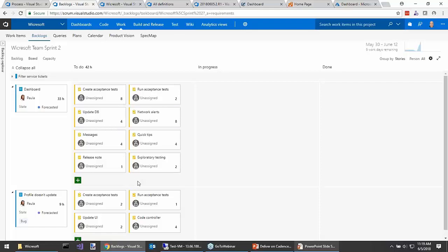Notice as they created the plan, these hour estimates, and we're talking about hours now when we're at the task level, not necessarily story points. These are a little more concrete and less abstract. I know some teams that will do that. They'll just put ones in all these and they can forgo the sizing of the tasks, but they'll still have a way in looking at the burn down to assess progress just basically by counting the number of tasks remaining as opposed to the size of those tasks remaining.